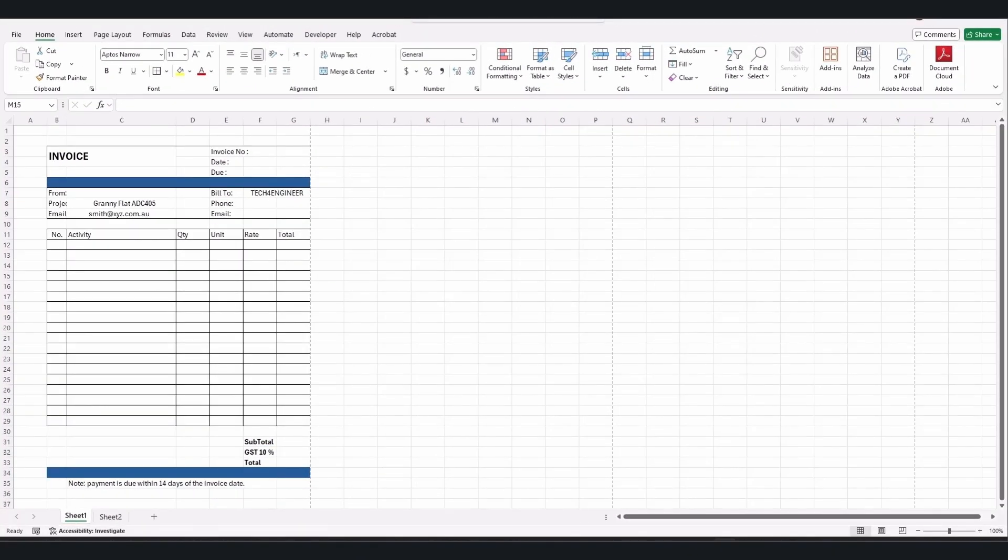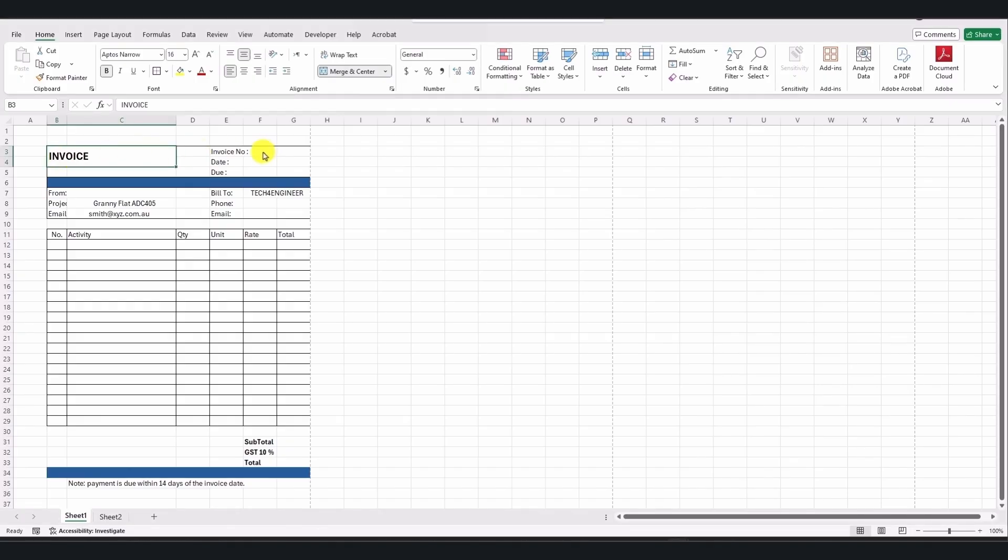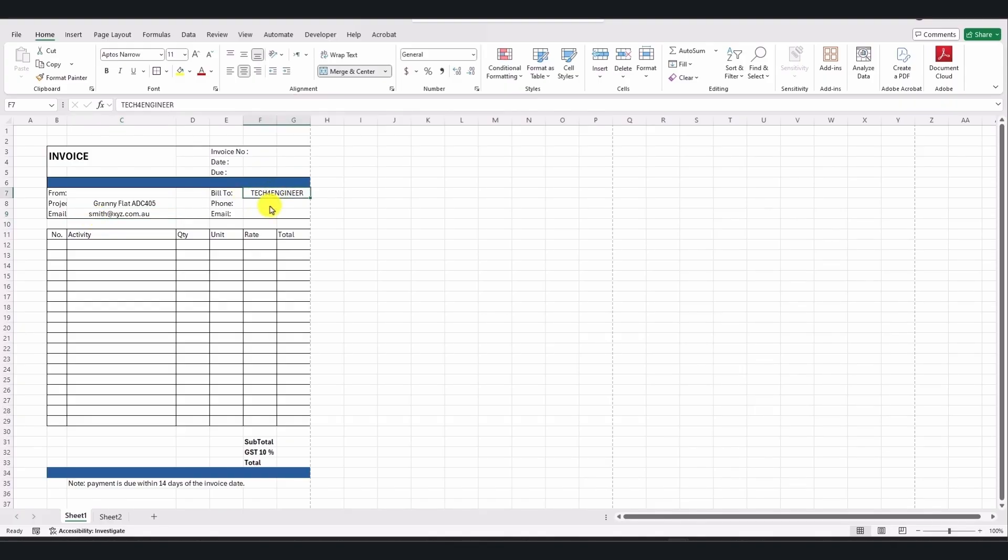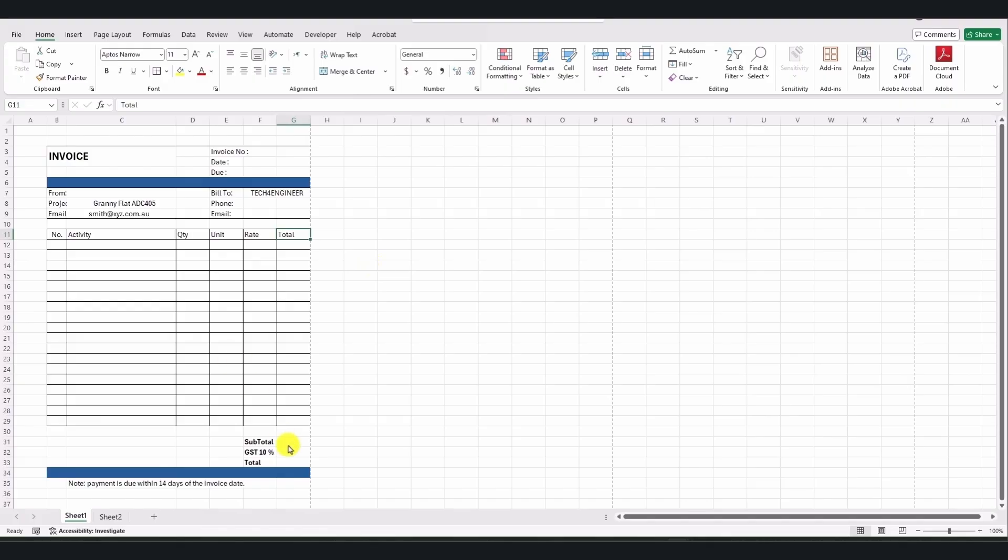So, let's get started and build this from scratch. Depending on your needs, industry standards, and project requirements, the first step is formatting your invoice. The invoice title, invoice number, date, due date, contractor name, for example XYZ Construction, and the client name Tech4Engineer, the name of this YouTube channel. It also includes the project name and an email address. Below that, you'll find columns for activity number, activity name, quantity, unit, and total amount. At the bottom, it includes the subtotal, GST or tax percentage, and the total invoice amount. You can also add a note at the end, if needed.